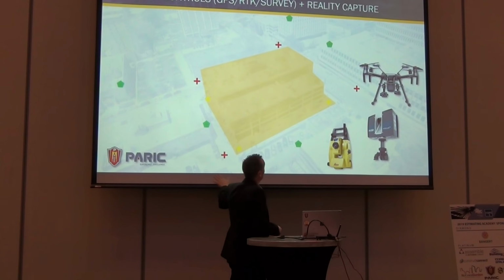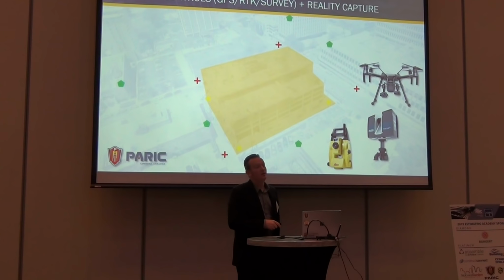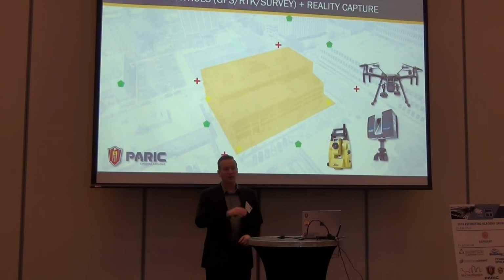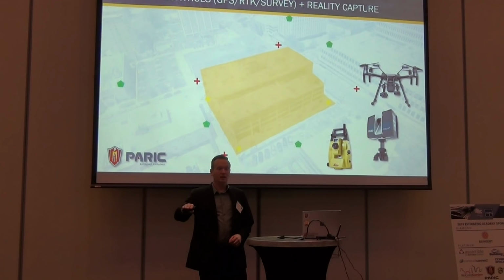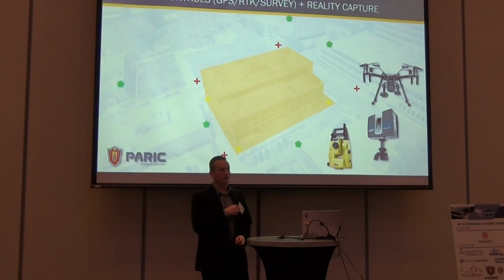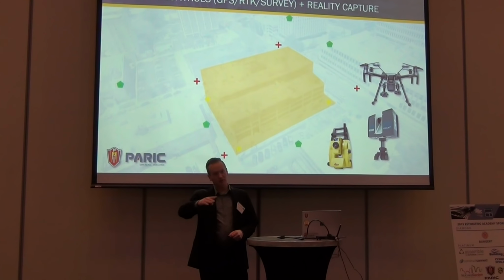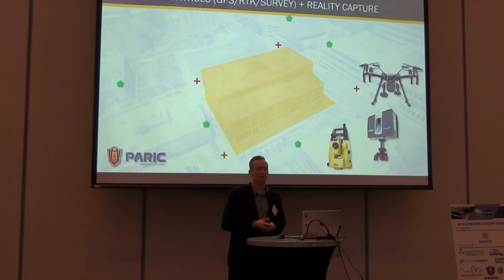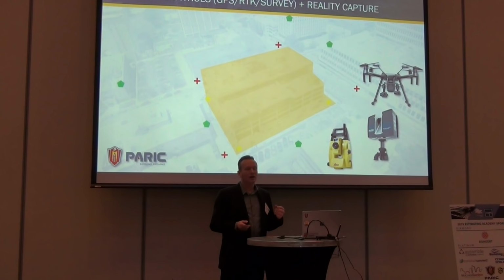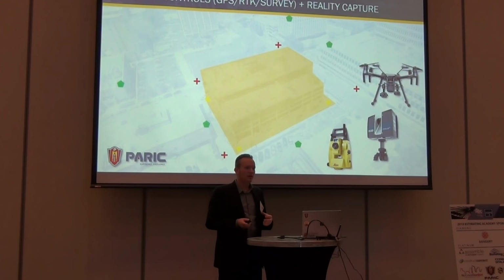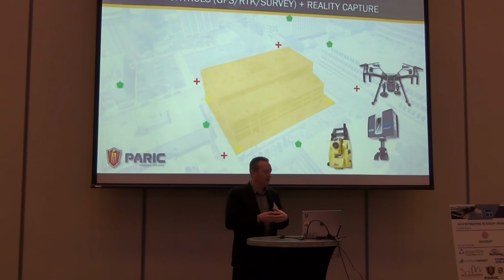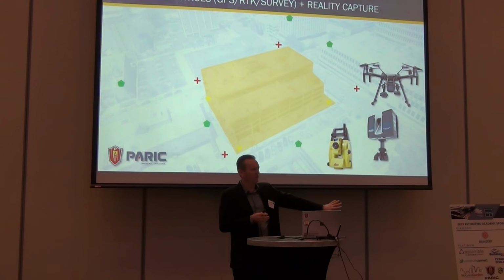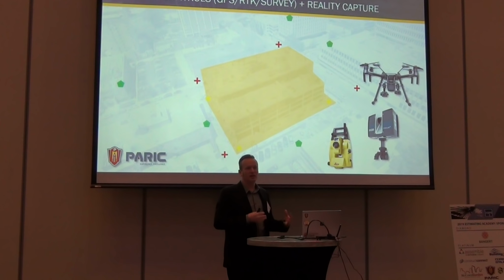Imagine this is a great big field, and we have a lot of earthwork to do. Now I have my baseline. If I want to do cut and fill analysis from my civil engineer or from my architect, who gives me a conceptual topography file that I can work with, at least I have something to work with. And it can be extremely conceptual, not even LOD 100, more like LOD 50, but at least I have something to start with.